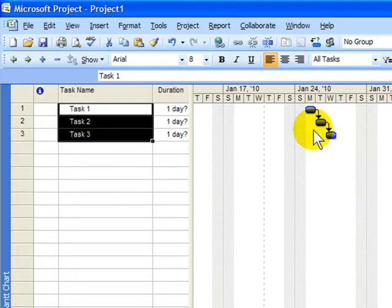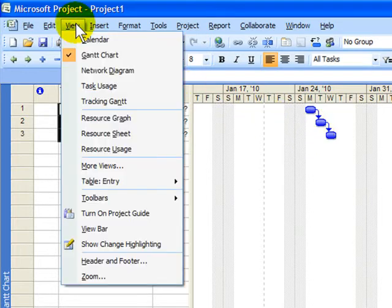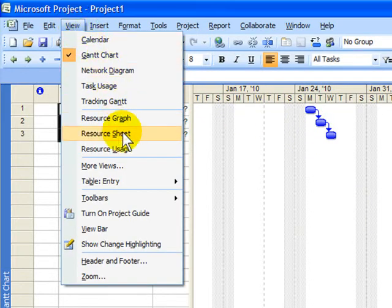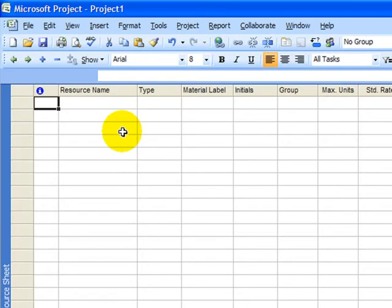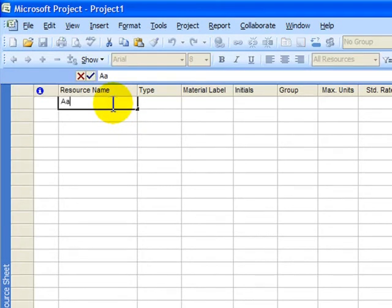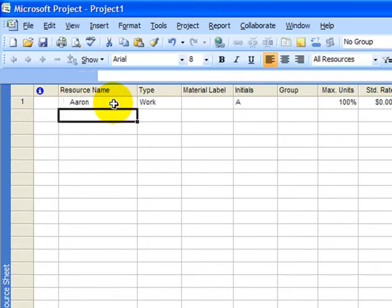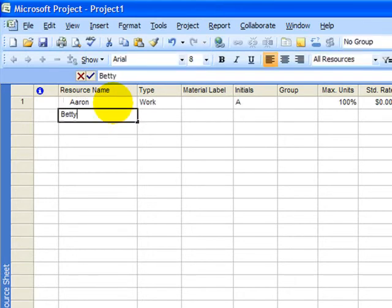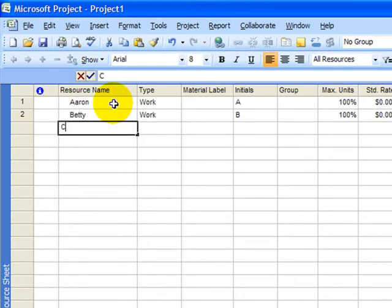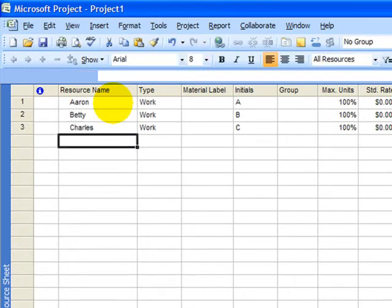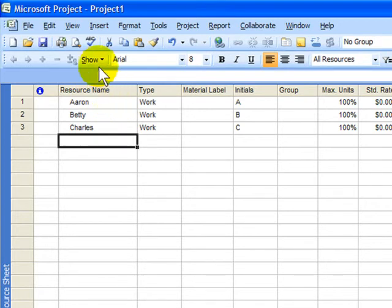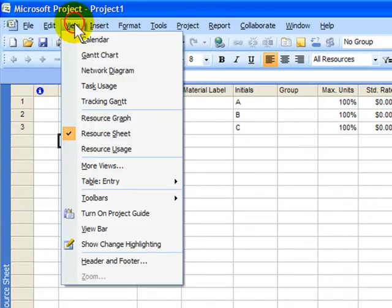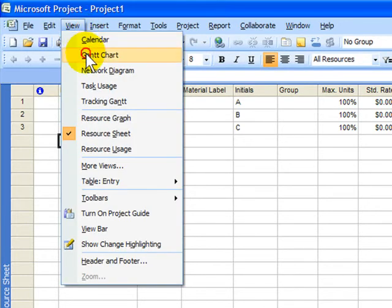Next, you go into making resources. So I choose View and I choose Resource Sheet. And this is where I can type the names of resources like Aaron and maybe Betty and maybe Charles. All of those are resources that I can now use in my project. I'll go back to the project screen by going back to the Gantt chart view.